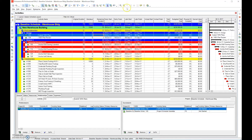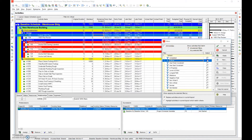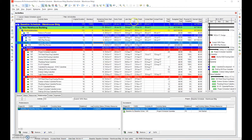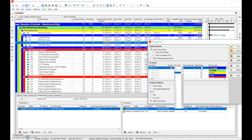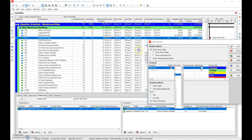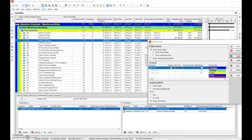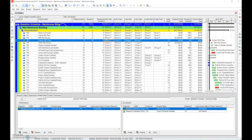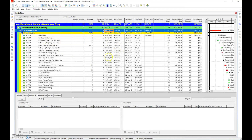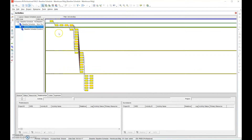The reports we're going to do include: the critical path report, which I just showed you. Then we take off the critical path filter to show all activities — this is called the banded report. I always filter by early start for the banded Gantt chart. Then we do a continuous flow schedule — remove the WBS banding, maybe show the second or third level of the WBS. I like to keep pre-construction and construction visible on the continuous flow because it's meant to be used by a superintendent who doesn't need to see all the banded areas. Then we do the network diagram — just click on it and view it.